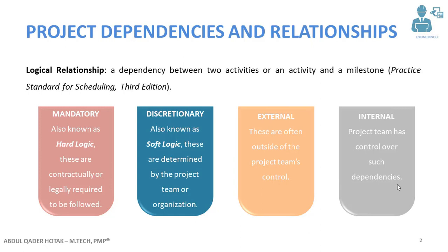As is very clear from its name, mandatory dependencies must be followed because either the contract or the law imposes them on the project. Discretionary dependencies, also known as soft logic, are determined by the project team or the organization itself, based on best practices in the field. In this situation, an activity could be sequenced with another activity in more than two ways, so the project team decides which way to choose.